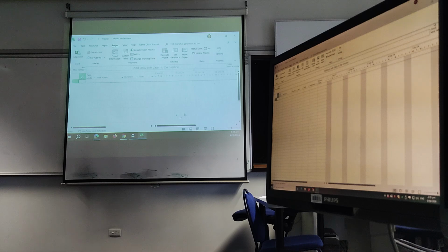One of the things that you can do to stuff it all up is to put a date in. Because what the date does is Microsoft Project says, forget about what is the most efficient way to do this job, this task has to happen on this day.